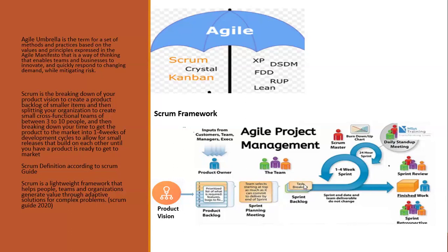Of course, what is the sprint backlog? The sprint backlog contains the sprint goal. Every sprint must have a goal. Then the plans to deliver that work and the selected product backlog items, right? People in class already know this, but if you've not had that, you still do it in class, right? So when they've done that, you break this down, plan the sprint, and write the sprint goal and all that, within the duration of the sprint. It's going to be 2 weeks or 4 weeks.